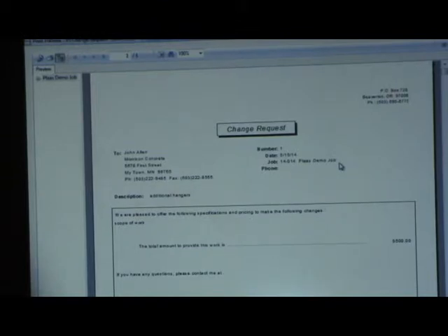When we get to the change order piece, it will say, here was your original contract, here's what you're approving, here's what your revised contract is. This is step number 1 where you're asking to do the change order. Or when they say, hey, if you do that over there, how much would that cost? You're sending them this piece of paper to say, to do that extra scope would cost this much. Really, out of Timberline, they would be signing for your approval to proceed, correct? The bottom? Yes.